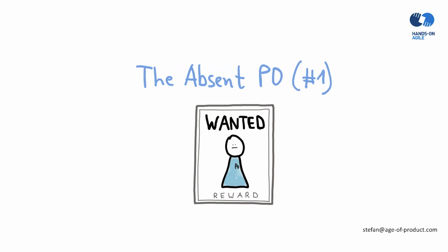It's all about the real-time collaboration between the product owner and the development team. This is really supposed to happen every day, every hour, if the development team needs it. There's another issue with the product owner not being present. Inevitably, it will lead to a sort of delay of accepting tasks and thus creating an artificial queue, which is seriously a problem if QA is not yet largely automated.